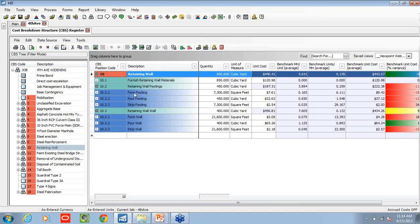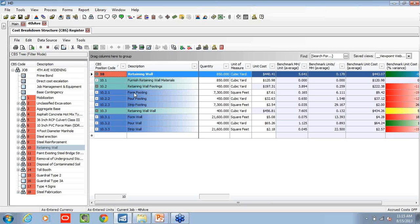We can benchmark both our estimated values as well as bring in the actual results from viewpoint. As we're building out a new retaining wall, how is this performed or is this in line with what we've done in the past? So looking at this particular line item retaining wall, we have 850 cubic yards, and our cost is pretty close.